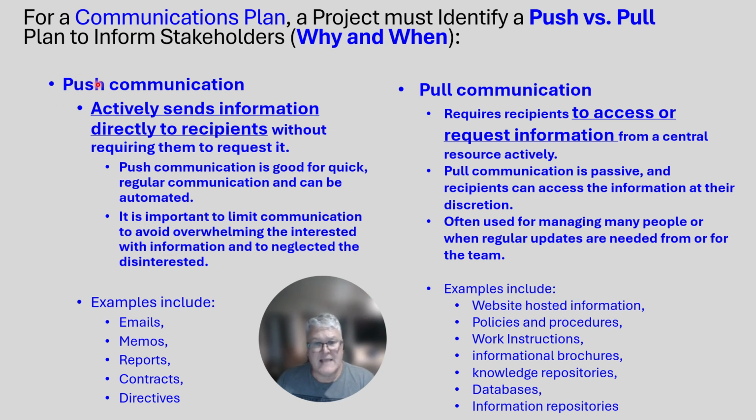So an example of push communication is an email, a memo, a report, contracts, or directives. So you throw it out there and say, here's what it is. You don't necessarily have to respond. You might have to respond and say, yeah, I got it. Now I know what it is. I've read that. Okay, so a flag comes up in the email to let you know they've received it. And so push communication is good for quick, regular communication and can be automated.